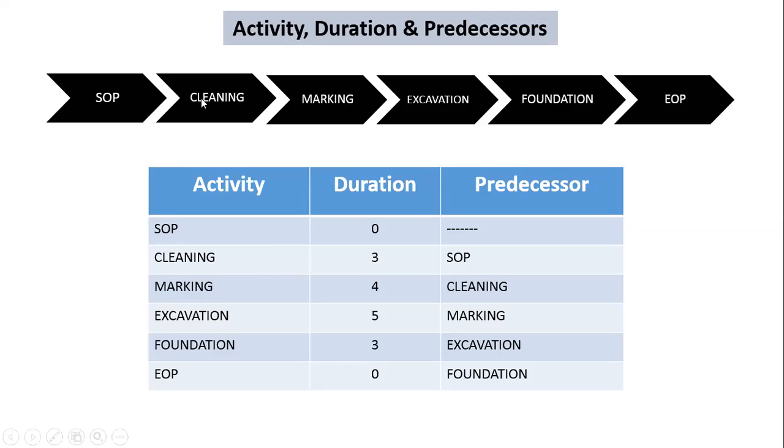That is, SOP is the predecessor of cleaning, right? Yes or no? Yes, sir. SOP is the predecessor of cleaning. Next, cleaning is the predecessor of marking. Then marking is the predecessor of excavation. Then excavation is predecessor of foundation. Excavation is the successor of marking. Foundation is the successor of excavation, and end of project is the successor of foundation.